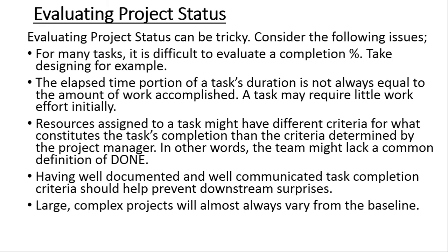So I'll just say a few points about evaluating our progress status. Because when we are reporting progress on a project, sometimes our definition of progress might actually differ. For many tasks, it is difficult to evaluate a completion percentage. Take, for example, designing. These are tasks which are not producing any physical output, so you can't actually measure how far you have gone. You can't say I'm 10% finished with my design.